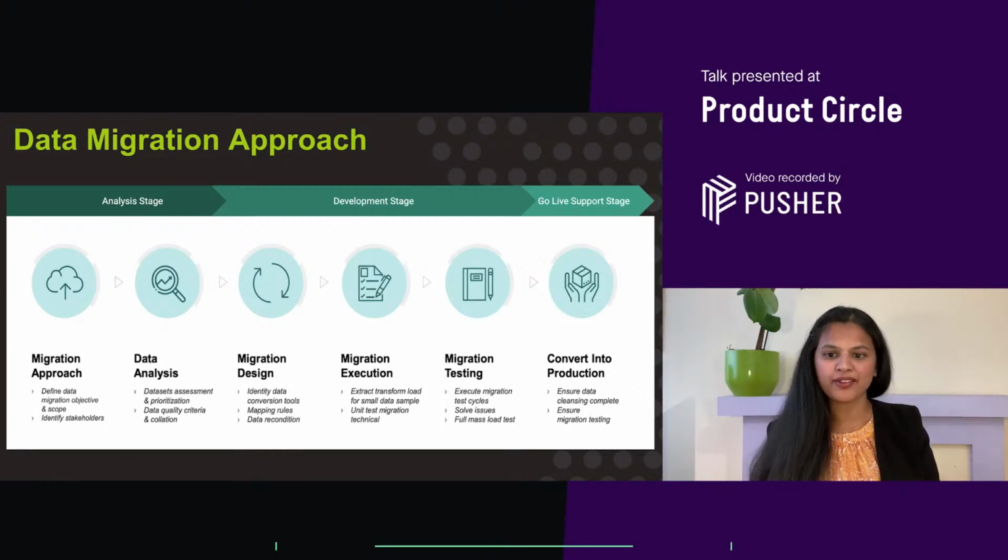Before actual migration starts, we define a business process flow where every customer needs to go through a pilot run of real customer data to check whether the end-to-end flow with all integrations is working as expected or not. Once the pilot run successfully completes, we cleanse the customer data and perform the actual migration.